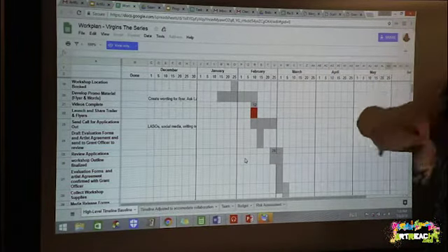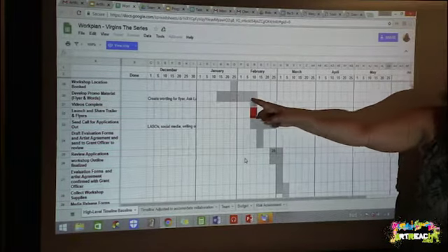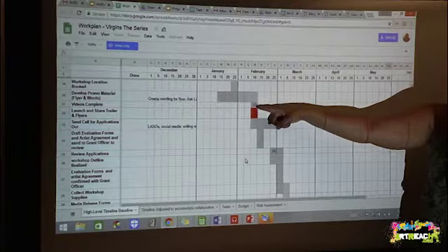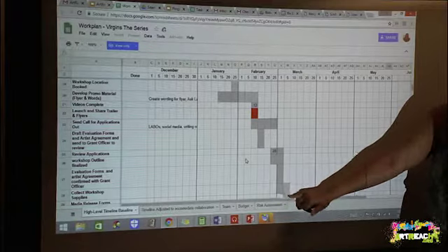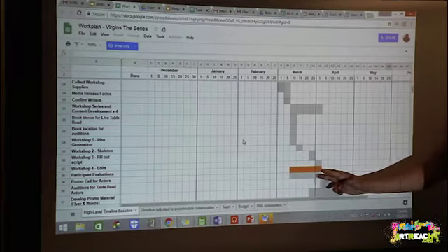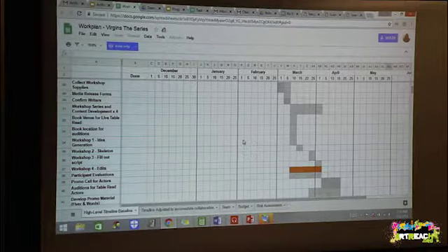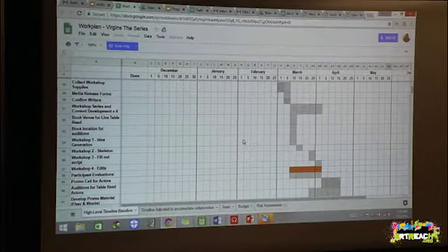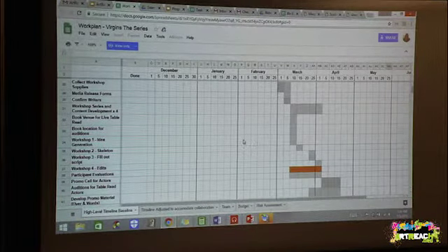Like we were talking about in the PowerPoint, this chart will tell you this activity is going, and this means that this next activity starts when this one finishes, right? And there are some activities that are going at the same time. It's good for you to know that, because sometimes we want to jump onto the next thing, but that thing requires the activity before to have been completed. If you jump in, you won't have the resources maybe, or it causes some other problem, and you end up having to come back.